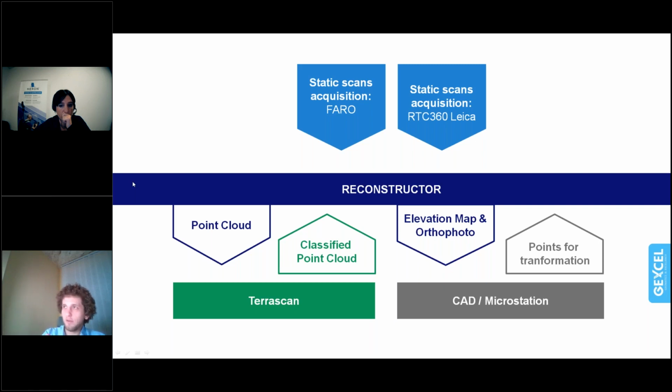does this concrete industrial floors has a look on this color deviation map, will nearly immediately see the problems and can plan the solutions. Because again, whenever you have an industrial floor with zones out of tolerances, correcting these problems is always cheaper the sooner you can do it.